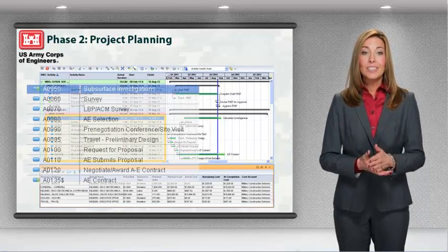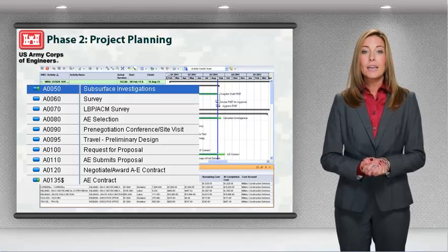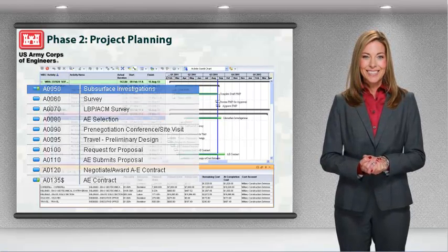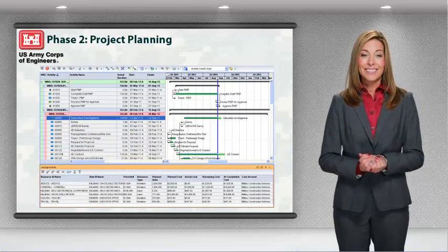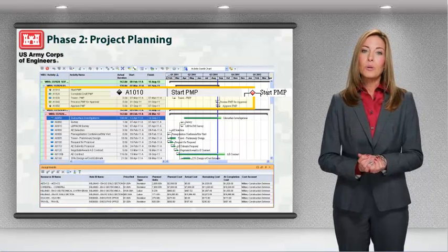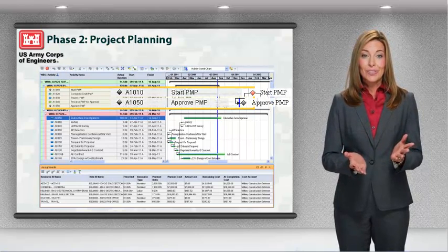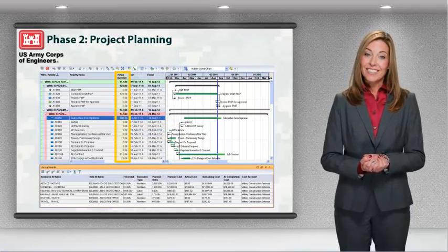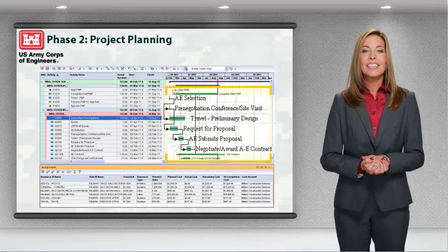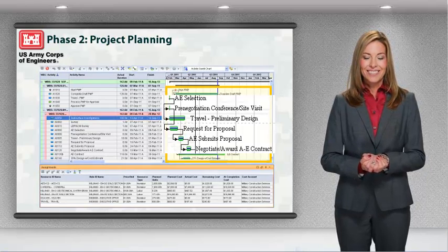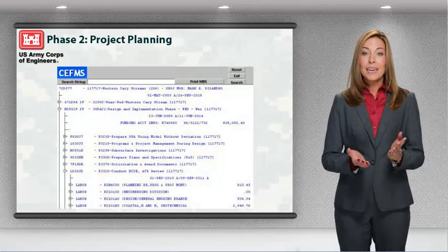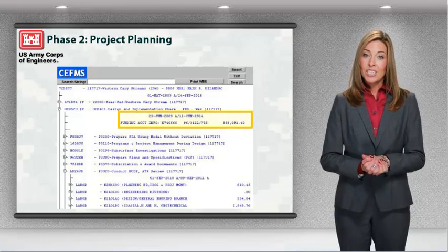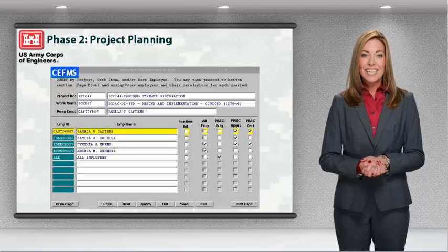The PDT will then develop a budget for all the activities that make up each work product in the WBS. The development process will result in the project's resource plan. The PDT will also build out the project schedule by adding milestones, activity start and finish dates, durations, and establishing relationships between activities. The project manager works with the resource management organization to classify the work items in CFMS, submit and secure the project funding based on the team's budget, and then assigns permissions to the team to use the project funding.